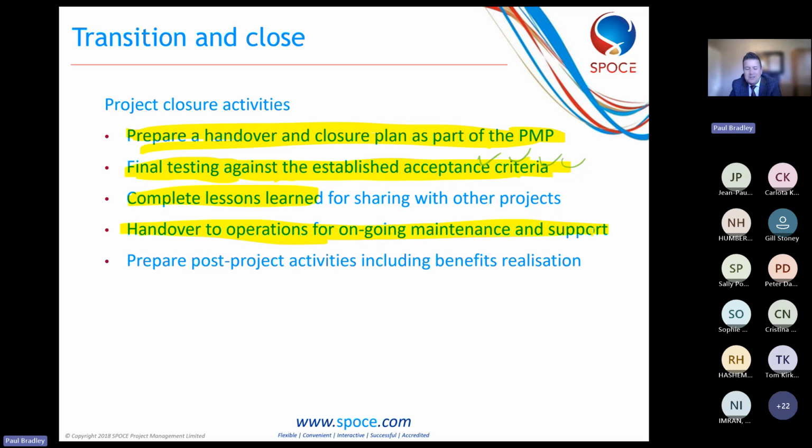So all of that information you've been building up, you will hand over to whoever's maintaining the products, so that they do actually understand what it's all about and how to do that. Also, any risks as well. You might have risks that are still a threat to the output. Okay, they've never actually materialized, but they're still there. So hand over information on that as well.